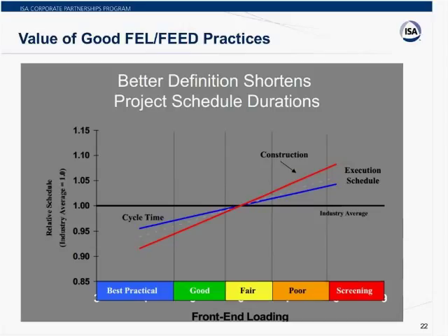The general answer I would give is the party or parties that have the experience and the tools and the processes to do it effectively to achieve the goals of the FEL process. So it should be whoever is most qualified and cost effective to do that. In our experience, often what we've seen is that high-level initial FEL work is done internally by the company. So FEL 1, FEL 0 level work typically doesn't need to engage any help.